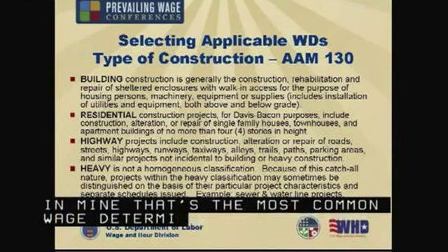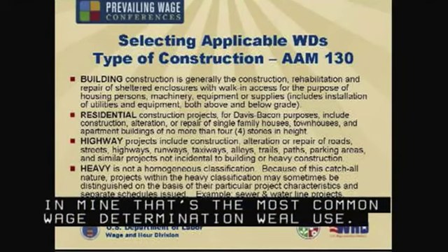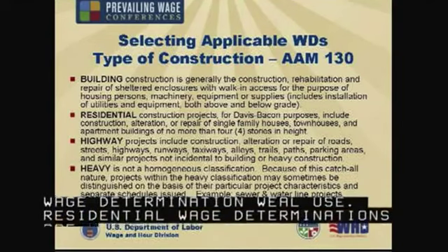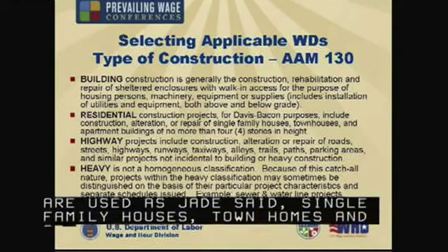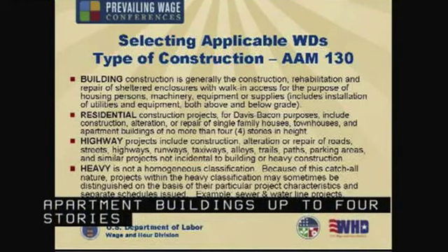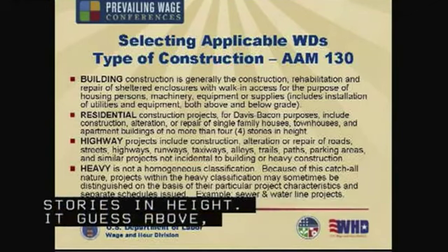Residential wage determinations are used for, as Jade said, single-family houses, townhomes, and apartment buildings of up to 4 stories in height. If it goes above 4 stories, then you're probably going to be using a building wage determination.